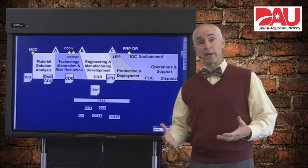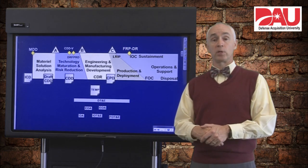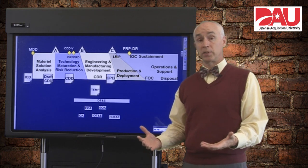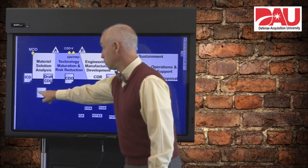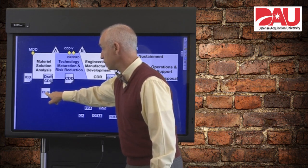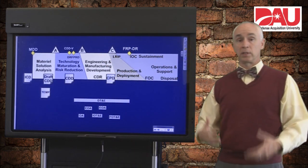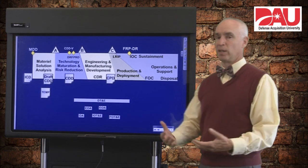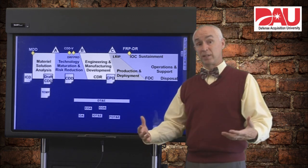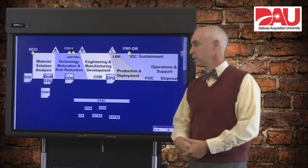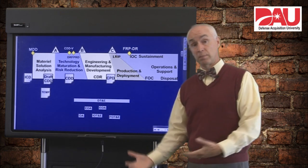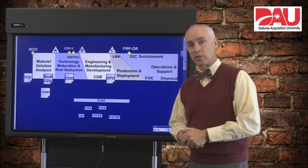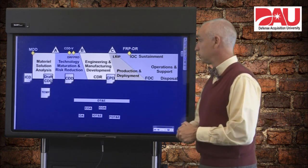Now let's take a look at where the different types of test events that we would expect in developmental and operational testing might occur over the lifecycle. First, you're going to start with a test and evaluation master plan that you're going to put together prior to Milestone A. To guide all of this, we're going to have a test and evaluation master plan, or TEMP, that's going to tell us what our schedule is for testing, what tests are going to occur when, and who's going to do those tests. That's developed by an integrated product team called the Test Working IPT, or WIPT. You have representatives there from your operational test community and your developmental test community, and you want your test chief from your program to chair that integrated product team.